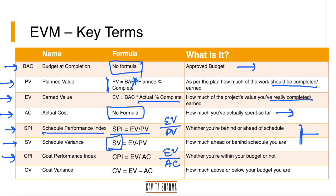CPI tells whether you're spending as per budget, more than allocated, or less. Cost Variance (CV) tells how much more or less you're spending than planned; formula: CV = EV − AC.